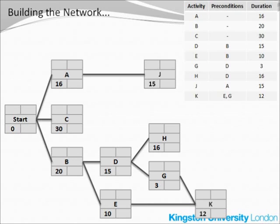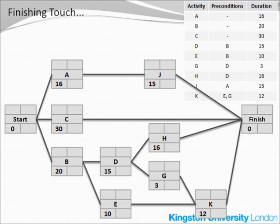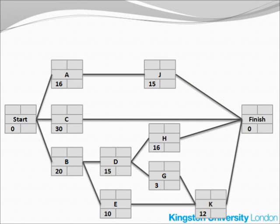We are almost finished, but we cannot leave any of the nodes without a line outgoing from that node. So what we need now is a finishing node, which would follow every activity that is not yet finished. This is the activity network with all the activities in it, ready to start the calculations.